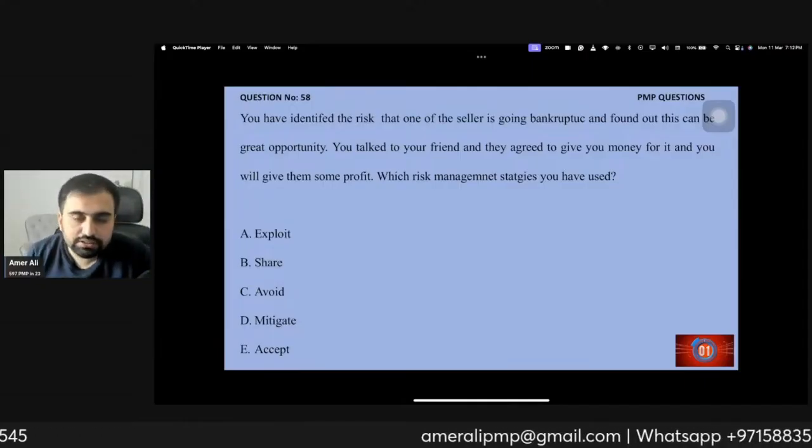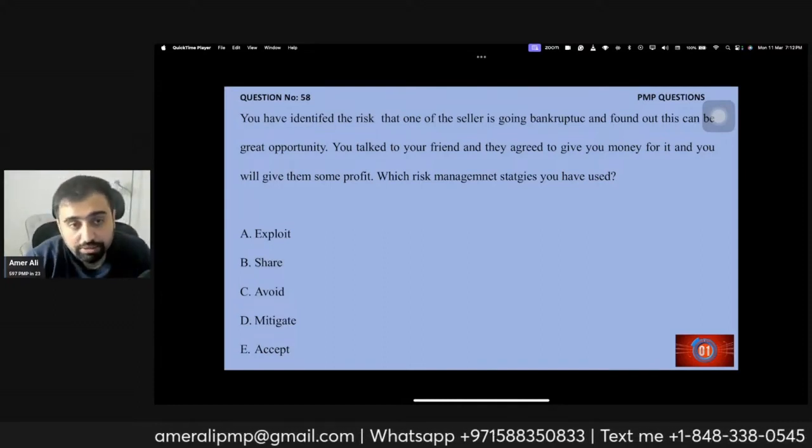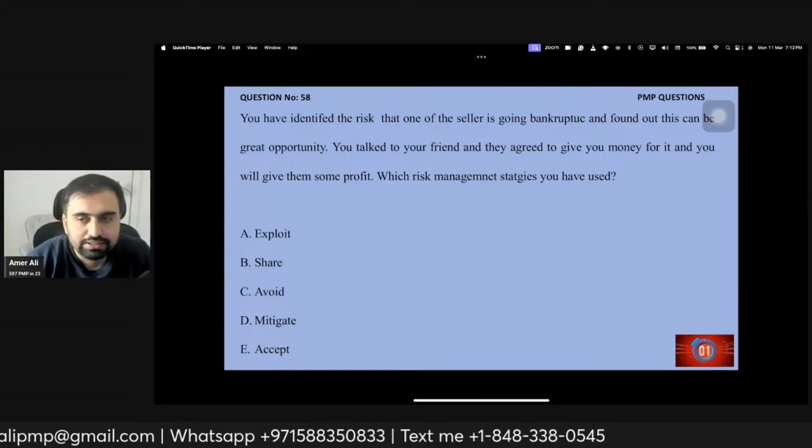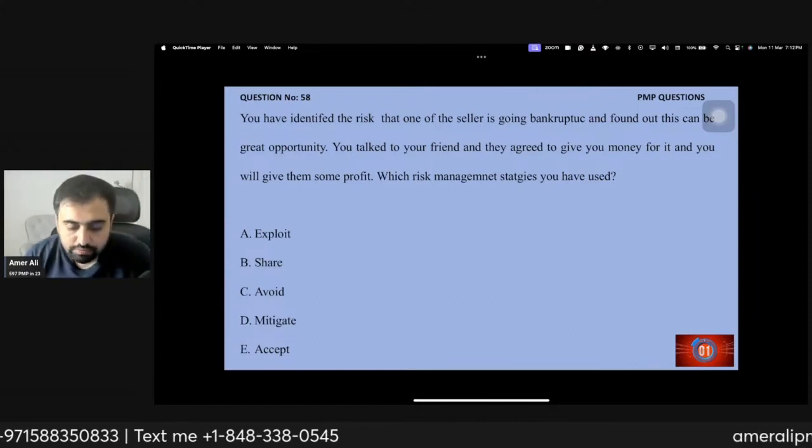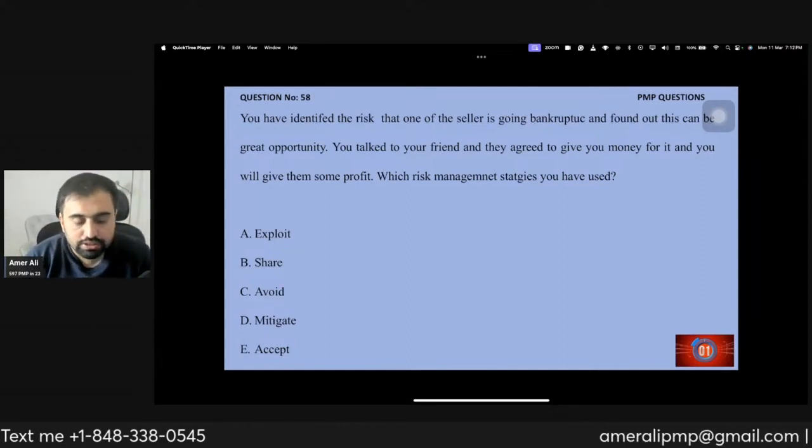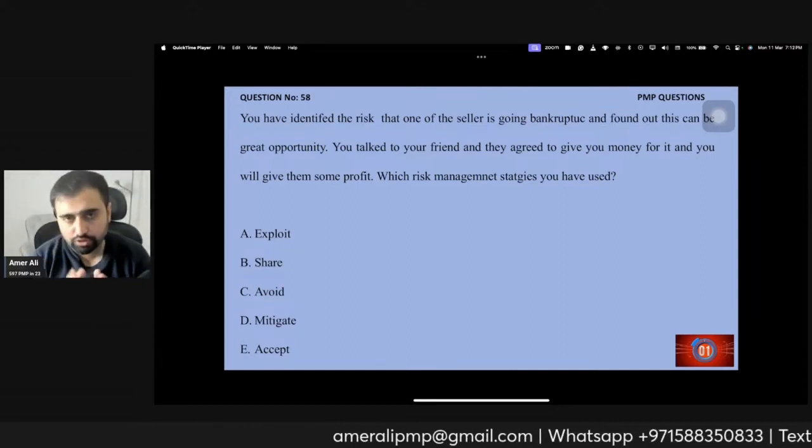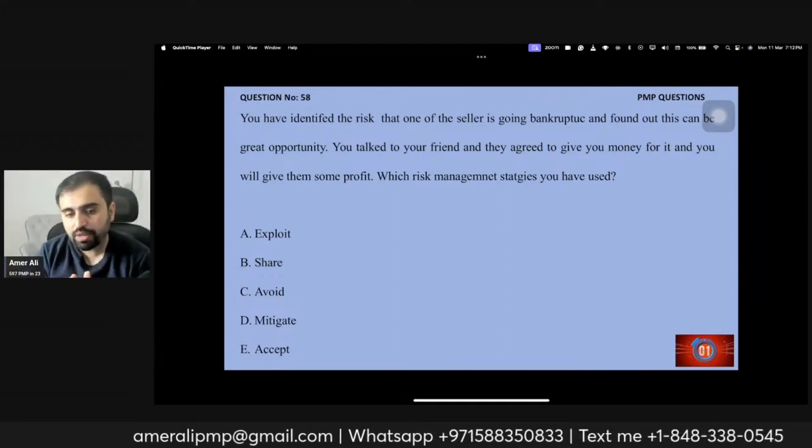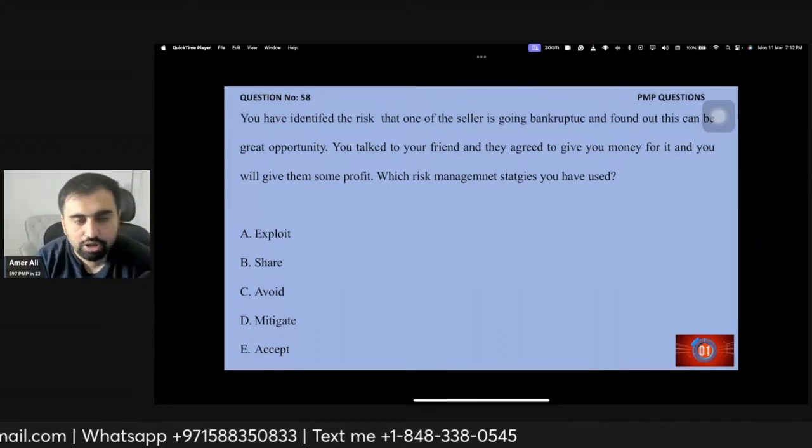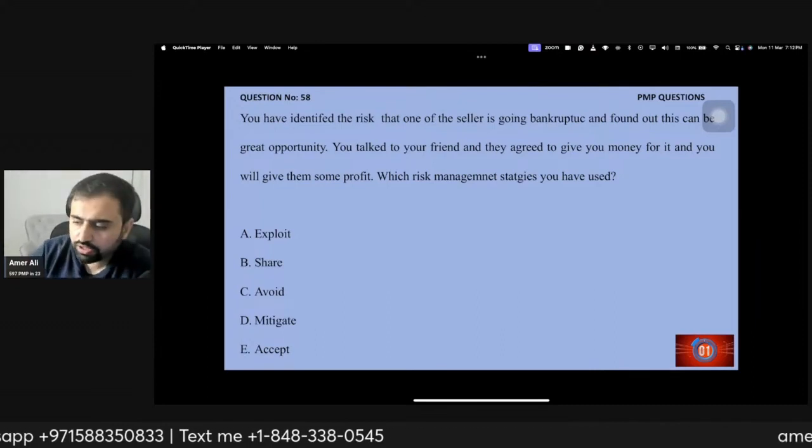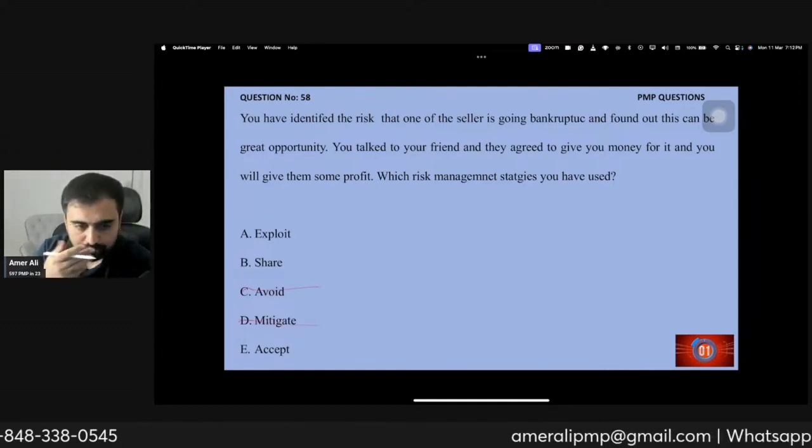You have identified a risk that one seller is going bankrupt and found out that this can be a great opportunity. You talk to your friend and they agree to give you money for it and you will give them some profit. Which strategy you have used? Now, very important thing: whenever we are solving question answers, we need to look into that, we need to identify that first of all is it a negative risk or a positive risk. So straightforward, it's not a negative risk. I can eliminate these two options.